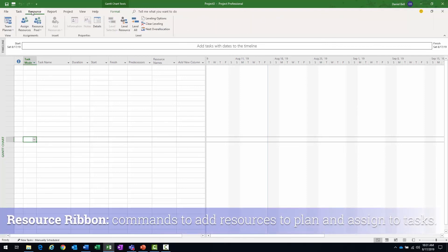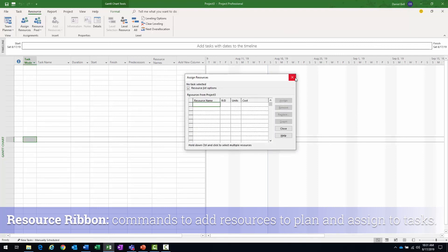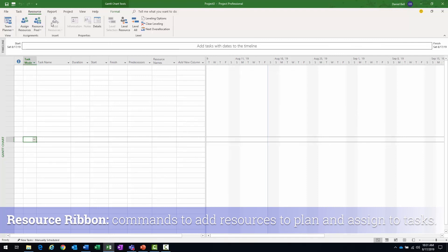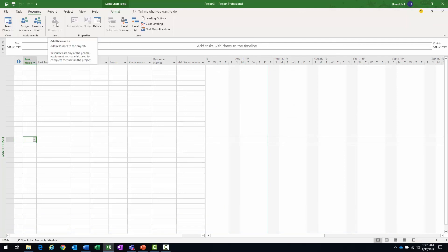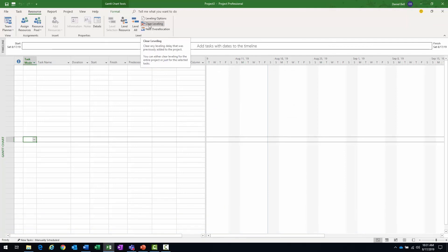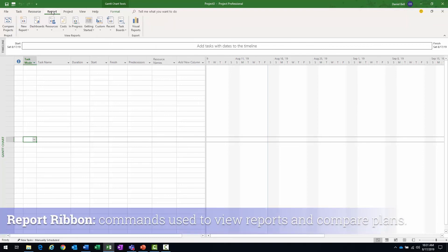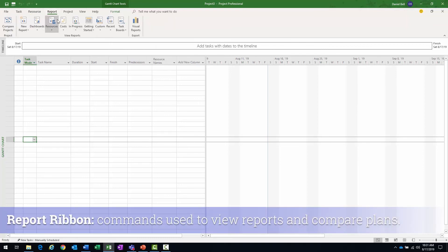The resource ribbon is used to add resources to the plan and assign them to tasks. See, so the assign is there. And then we have the ability to add as well. You can see details about resources and then there's some leveling options here. The report tab contains commands used to view reports and other options here.